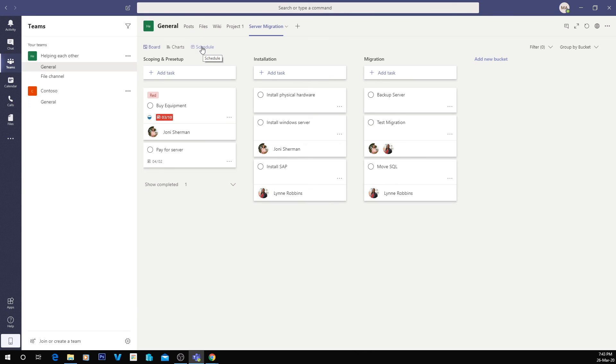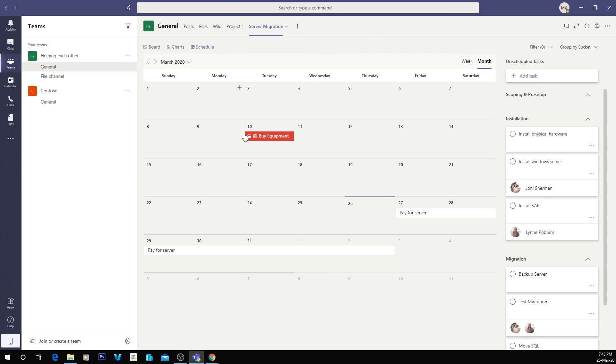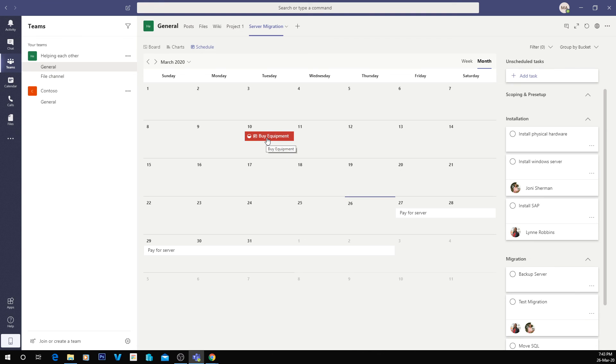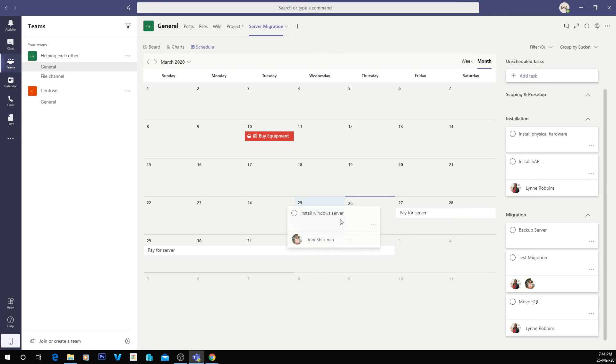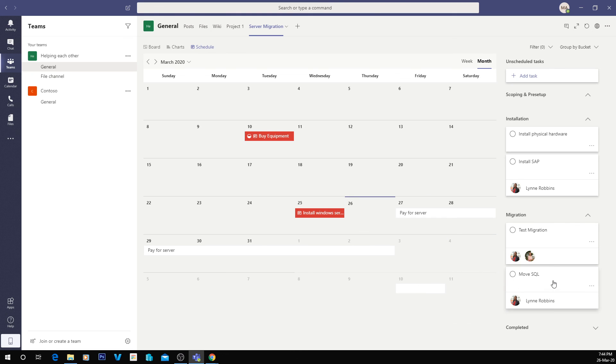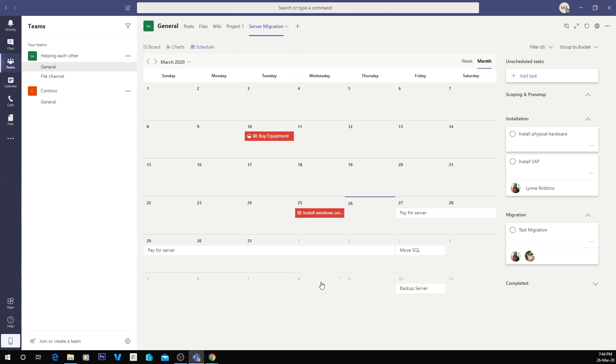If you want to do the schedule view, you can see here on a calendar what's done. So you can see we're meant to buy the equipment on the 10th of March, which today is the 26th of March. That's why it's red. We can also just drag tasks in to different dates and that will put them on the calendar. So this will give you a nice little view of what's coming up in a calendar view for the project.